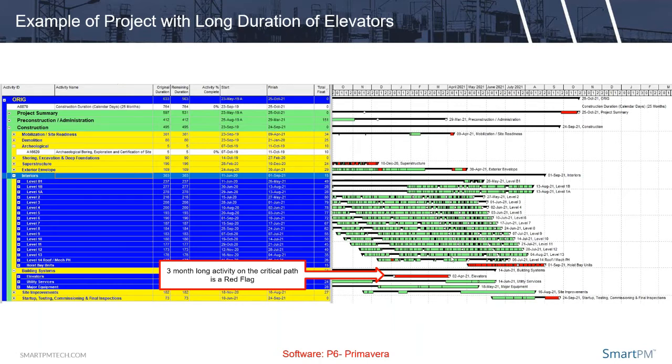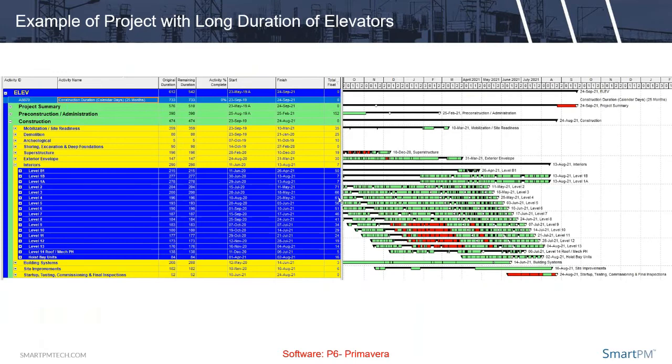So once I remove this or shorten this into a couple of different activities that were shorter, we see that the critical path goes through where we think it should go through, and that is the building, and most of the interiors ultimately ending up in startup and testing. So yeah, little things can change everything and put a job at risk. And that is why I say that quality is probably the most important metric of them all.